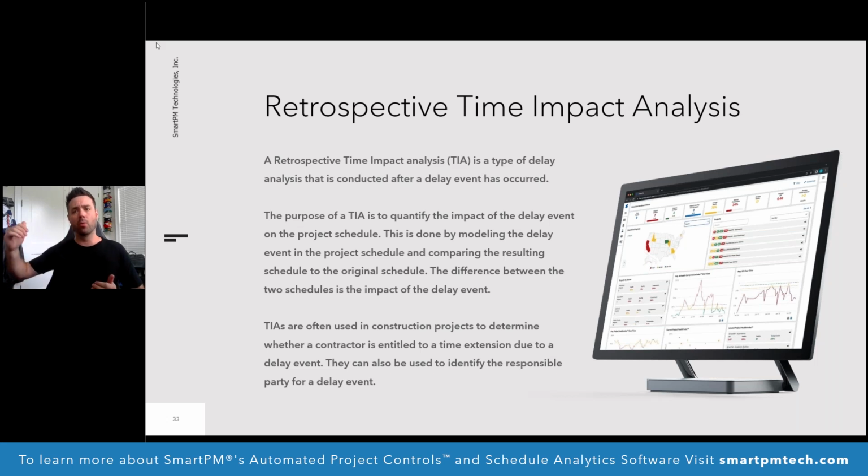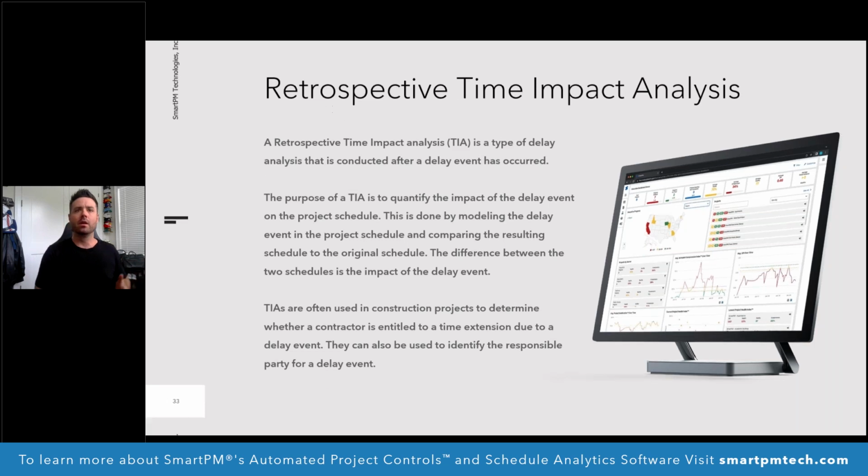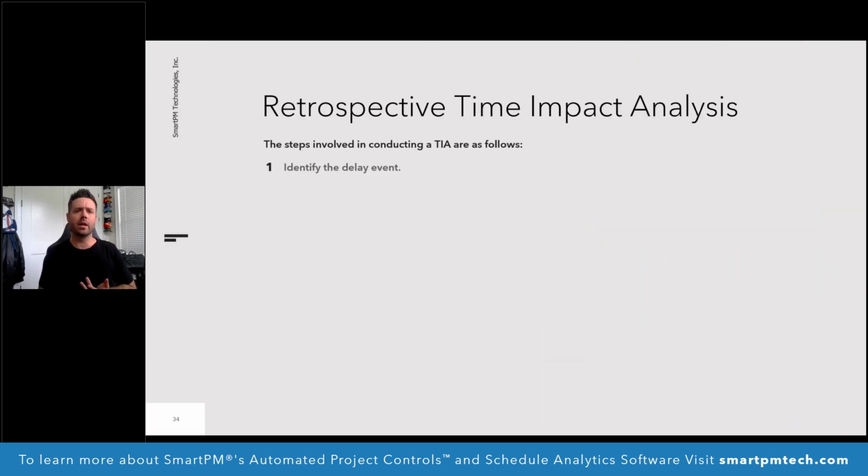So where before we were working on the right side of the data date and building out the impact in the future, now we've experienced the impact. We know exactly how long it took. We know exactly what activities it affected. And now we're going to take this latest schedule update that we have, and we're going to build it in the left side of the data date. So this is usually... Move to the next one.